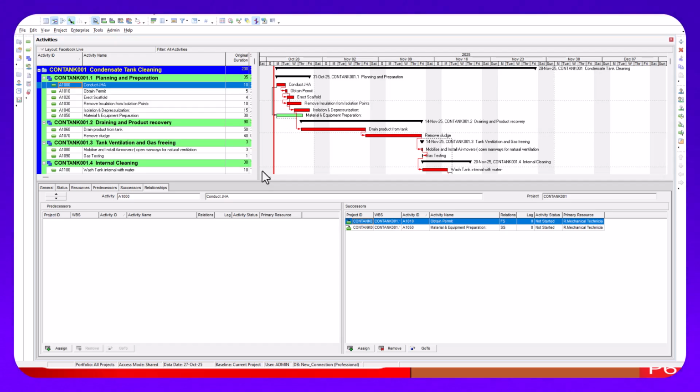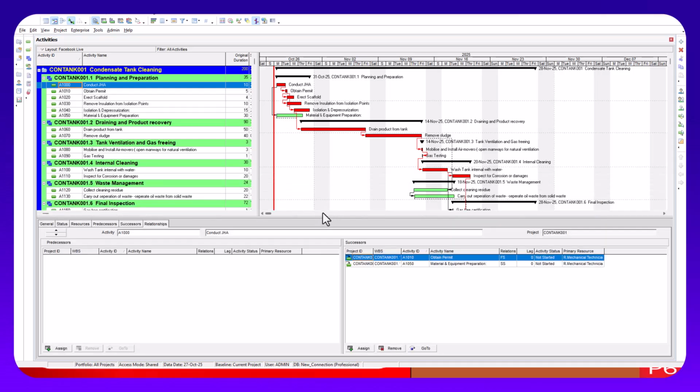They also affect critical durations, your critical path, your resource availability, and even project dates. So if your P6 calendar is wrong, your entire schedule will be wrong. That's why it's very critical to take note of whatever you're doing on your P6 calendar, because it will determine whether your schedule is correct or not.